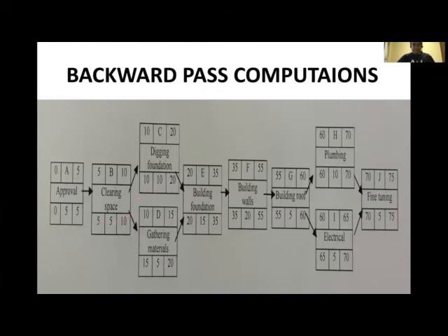So 10 minus 5, 5. All right. It's a single movement. So just duplicate 5 there, just like that. 5 minus 5, 0. This is correct. When you're going backwards and you encounter the same number here and here, you are correct.